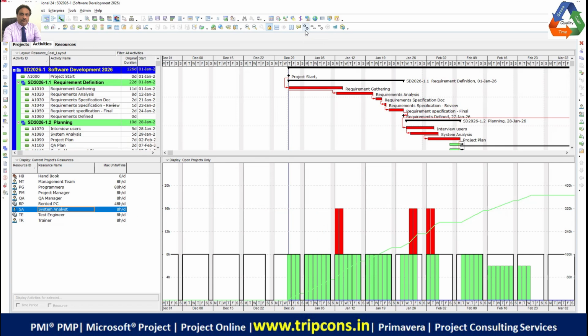So guys, you tell me one thing. If you reduce the work on the 6 days, then the duration is going to increase, yes or no? Tell me what your logic says. Going to affect the duration. Yes, it's going to increase. If you are doing less work, then it will take longer to finish the work.